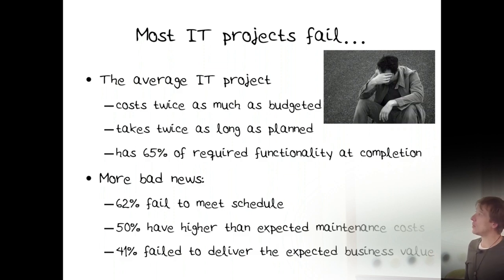So, IT projects. Most IT projects fail. The average IT project costs twice as much as budgeted, takes twice as long as planned, and has 65% of the functionality at completion. Can you imagine? We are in the software department or the engineering department of our company, and they're working their asses off. They ask us, can you do this? I say, yeah, sure. And then we fail to deliver again and again and again. How would they put up with us? So we have a bad reputation as a profession, and rightfully so. You know, we suck.